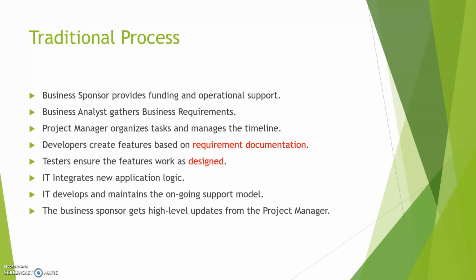So if we don't solve that problem, what ends up happening is the development team has to figure it out, and then basically they don't meet all the requirements. The weeks start going by, the scope gets pulled back, until funding runs out, time runs out, and only a small piece is done. The business feels misled and begins to have doubts about their IT department's ability to complete projects, which complicates future funding. So you have business sponsors that provide the funding and operational support, like a VP or a director.